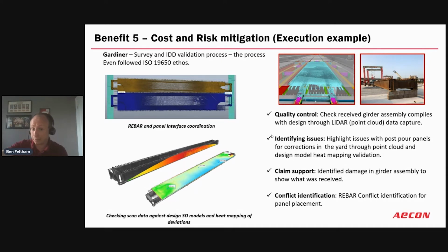So if the supplier is delivering the scan, they put it into Aconex, and that was given a status, suitability, and a name and a numbering system. So it could be tracked all the way through, and this is quite an interesting use of the data. We found it helped because a lot of times you might get scans that overlap, you might get multiple sets of data because one wasn't quite right. It allowed us to revise that data and keep track of that change. Traditionally, we would have it on a hard drive and just hand it around the office, and two people have got different versions of that scan. Really good. And we could analyze for all sorts of things here.